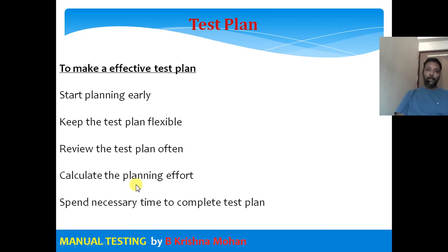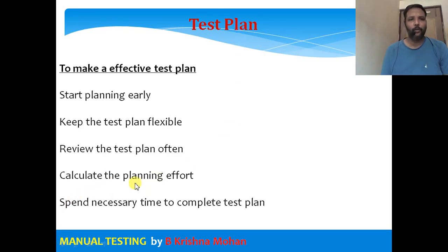Calculate the planning efforts. How many man days you are putting in should be calculated. As and when the man days increase, the cost is also increasing. So you have to consider how many man days we have planned to keep for testing, and it should not exceed those man days. Otherwise the project will be affected. So here we have to calculate the testing efforts. The testing efforts can be calculated in the test plan.